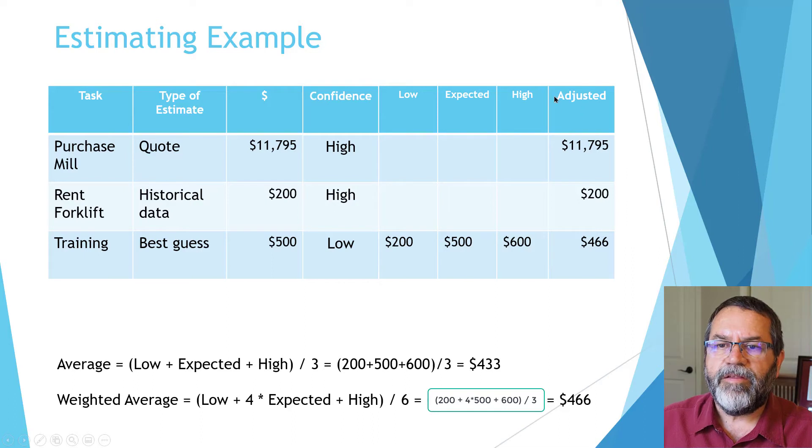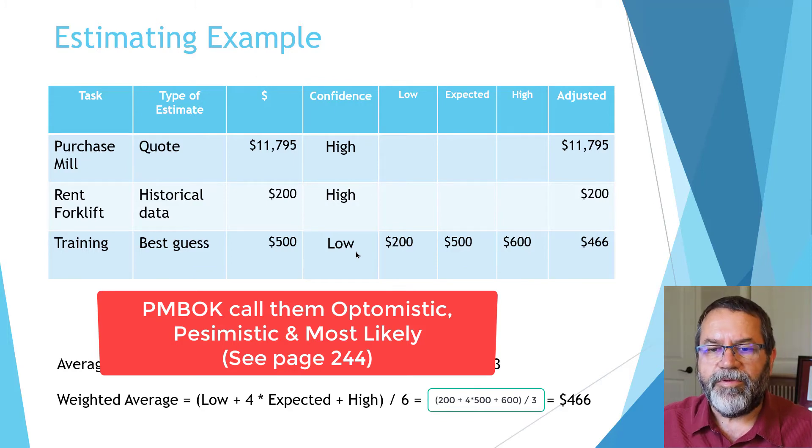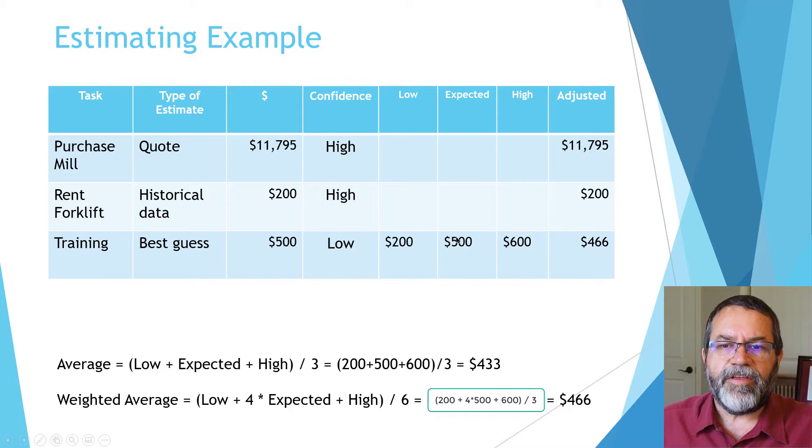On the right, I've got my adjusted price. For the mill, I've got a quote at a firm price, so I'm not going to adjust that—just plug in $11,795. Same with the forklift at $200. Now for training, I'm going to take the low price—I think it could be as low as $200, as high as $600, and what I expect is $500. There's two ways I can handle these parameters.